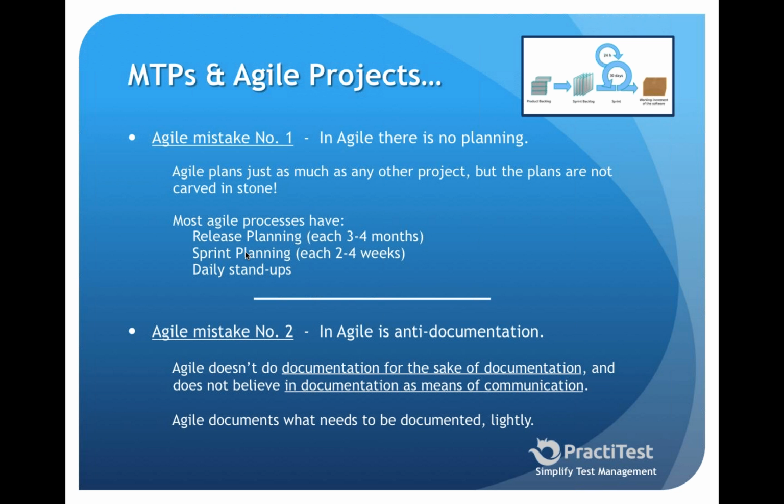Even if you're working Agile, even in companies that are working not only on sprints but even if you're doing continuous delivery, there's always going to be planning at the release level. Someone will come and say, for the next 3-4 months, these are the big rocks that we're going to be focusing on. Then you translate that in your case to the 4-week sprints. Still, there are plans, user stories, and objectives that you want to do as part of your project. So I guess that my MTP would come whenever your company is doing release planning.